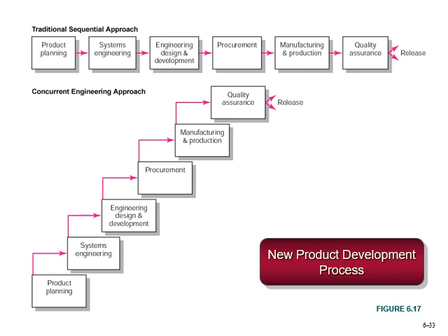We can do concurrent engineering. What is that? The product planning and the system engineering, there can be some overlap. After you're done with part of the product planning, you can call your systems engineer, who can start along with the planning people to think about how the system engineering is to be done. So that is the basic concept of concurrent engineering.